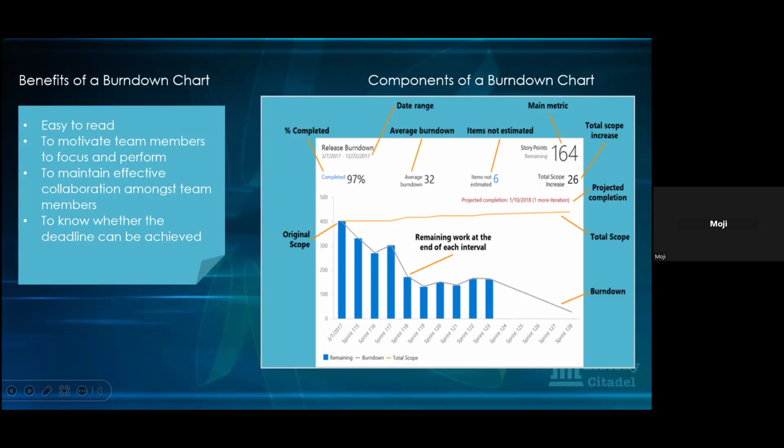Okay, so it's able to give that also, and you're looking at that as Scrum Master, and those are part of the things that will motivate your team. So this particular team is now looking at it and saying, the release has been planned for this particular time, so we have 5 more sprints to go, but the chart's projected completion date says you have just one more iteration to go. So this particular team still has a capacity of maybe 4 sprints to bring in more things, if they want to do technical debt, or maybe regression testing or anything on what has been done before the release. They have enough time to be able to do that. Okay, so that is what this chart is talking about in a nutshell.